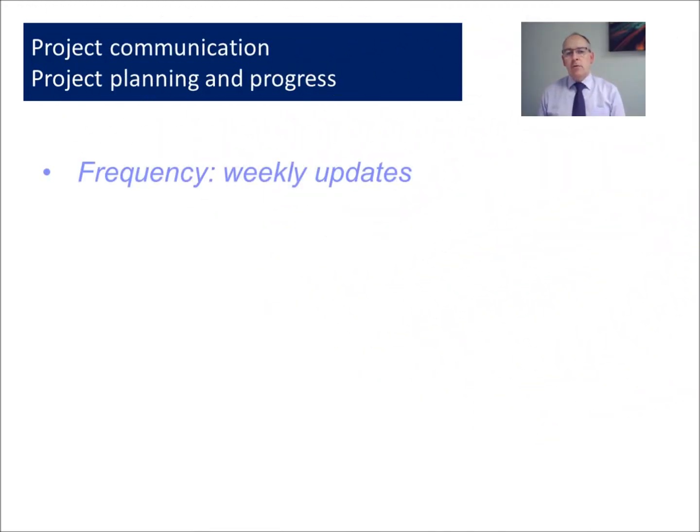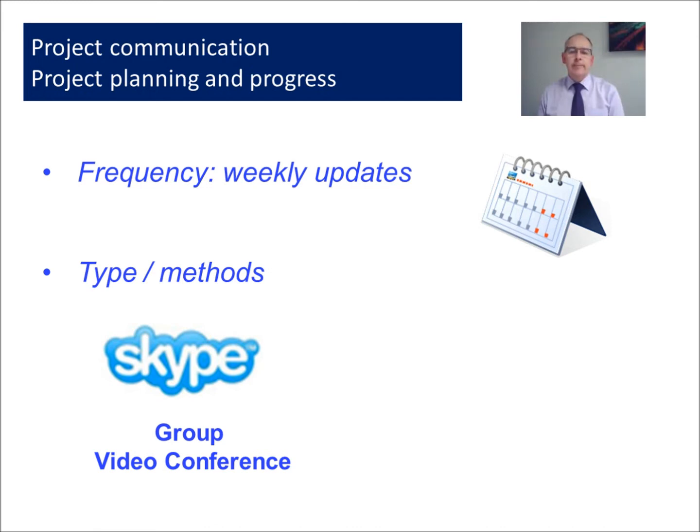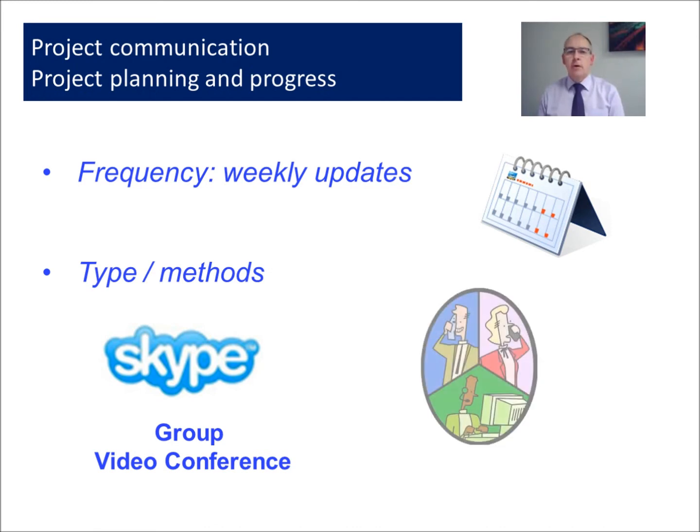Finally, what's the frequency for this plan update? We'll assume that we want weekly updates. And what's the method of getting the update? Well, rather than rely on email, we could perhaps use video conferencing using a product like Skype, or have audio conferences. Either way, we're seeking to get verbal feedback from our colleagues on those items relating to duration that we saw on the previous scene.